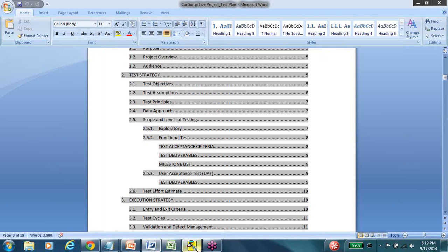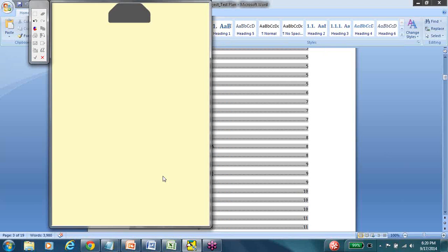That is basically strategy. Now planning would be assigning a certain budget, a certain time, giving a certain date. You add all of those parameters to your strategy, and that is what becomes your test plan. So the test plan is always created over your strategy, and the test plan has specifics like this date, this much time, this much effort. Test strategy is the overall agenda of how you're going to deal with it.